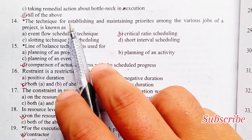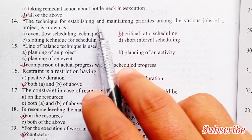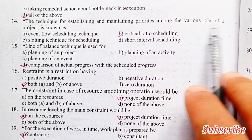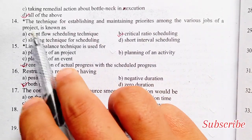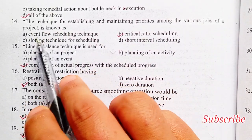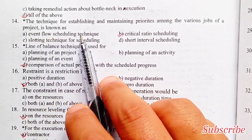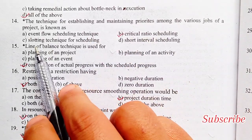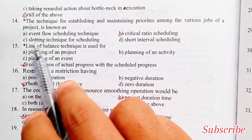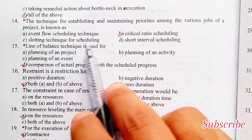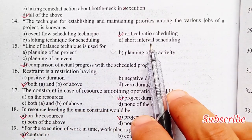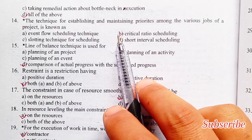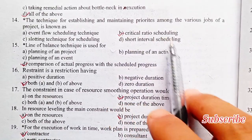The technique for establishing and maintaining priorities among various jobs of a project is known as: event flow scheduling technique, critical ratio scheduling, slotting technique for scheduling, or short interval scheduling. Option B is the right answer — critical ratio scheduling.